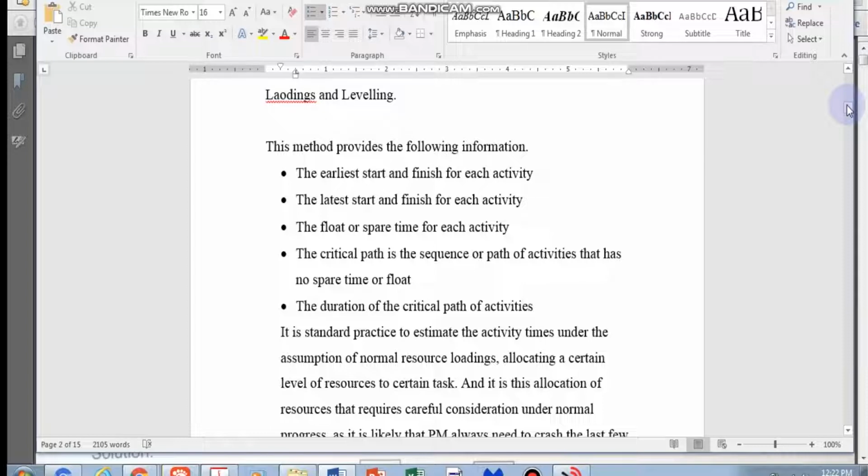That's number one. And then if you know that there are critical activities, you know where to focus your resources. Something for you all to note as well: if the delay is occurring on other, non-critical activities, you could look into the spare time available for that activity, what we call the float time, and make other arrangements, but it is not critical. But a delay in a critical activity will delay the entire project, and therefore you may have to pump in more resources to it.